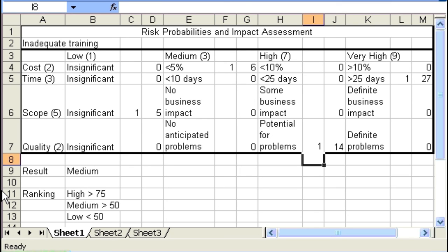And now we see the total risk impact for the project. This risk of inadequate training is being ranked as a medium grade risk for our project. And that's simply the result of the addition of a 6 computed for cost, a 27 for time, a 5 for scope, and a 14 for quality. So taking all of those together, we add them together, and it's assessed to be a medium, and that's simply because the result is greater than 50 but less than 75.